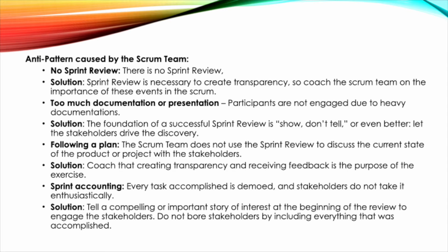Sprint accounting. Every task accomplished is demoed, and stakeholders do not take it enthusiastically. Solution: tell a compelling or important story of interest at the beginning of the review to engage the stakeholders. Do not bore stakeholders by including everything that was accomplished.